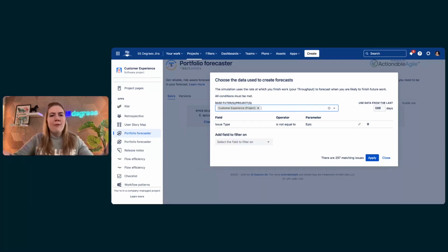But what if you changed your processes a few months back, and now you have a very big project that contains lots of epics, but 6 months ago you went from no methodology to applying Scrum or Kanban. So you've reorganized how you're doing your work, you're slicing it differently. So you can't really use the data from the beginning of that project, because that doesn't really represent how you're doing work now, right? So know your data, take a deep dive into what's going on with it.